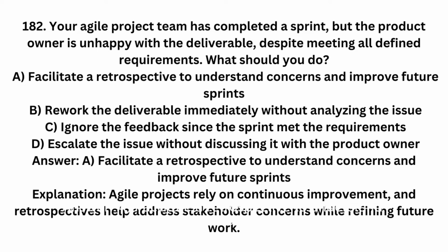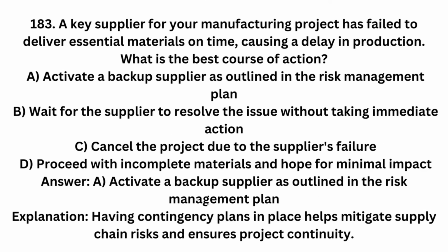Answer: A. Facilitate a retrospective to understand concerns and improve future sprints. Explanation: Agile projects rely on continuous improvement, and retrospectives help address stakeholder concerns while refining future work.